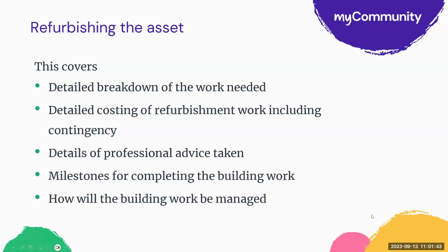We're also looking at the milestones for completing the building work. As Zoe pointed out, COF grant funding is expected to be spent within 12 months. So we're looking at how you're going to complete the building work within that kind of timescale. Clearly, if it's a very large building project, that may be really quite tight. There's also likely to be a sequencing about that building work, that you potentially start off by dealing with the roof and ingress of water. You may then move on to other parts of reshaping the internal of the building and so on.